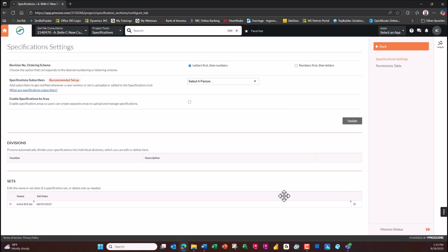And one thing I talked about in a previous video that I want to stress here again: doing this and putting this together really isn't enough. It's very important that you put the verbiage, the language, into your contract that all subs and vendors have to, and are financially and legally responsible to, use only this location for the latest and greatest files, that everything they build and work off of has to come from here.